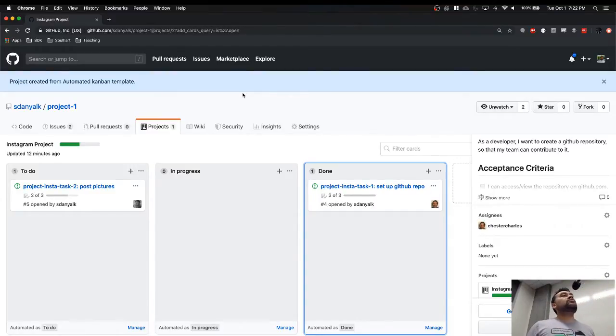And your meeting gets over in like 5 or 10 minutes. That's it. What did you do yesterday? Today? Are there any roadblocks? Now, at the end of the meeting, when everybody is done, then we come back to our roadblocks. Usually, it's better to write it on a whiteboard if there are any roadblocks. When the meeting is over, only the people who think they can help with that roadblock stay in the meeting. Everybody can leave. Okay, saves time. 5 minutes, 10 minutes over, and everybody can go back to doing their task. All right.